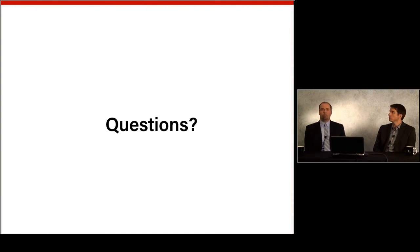Yes and yes. One of the big concerns, we looked domestically to try to find somebody who could create a system like that for us, and unfortunately we weren't able to find somebody domestically, so we had to go to Europe to find the system. And it's a big concern on how we are going to manage that. The interesting part is a lot of the components of that system are actually made in Chicago. So there are contractors around that are familiar with some of the components. We also have up in that mezzanine some of the hard-to-get pieces. We ordered backup parts, and so there's a small part storage area on the mezzanine for those elements that may have a lead time to get because they're coming from a long distance.